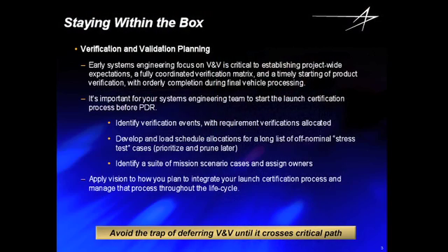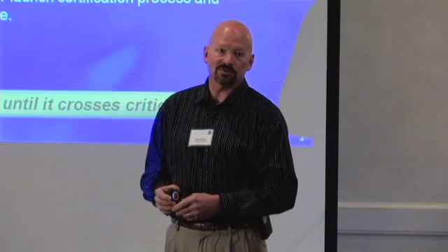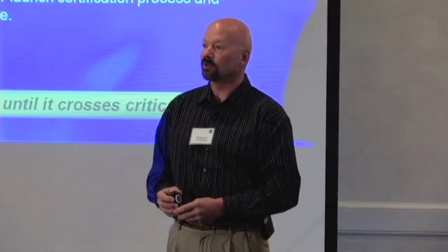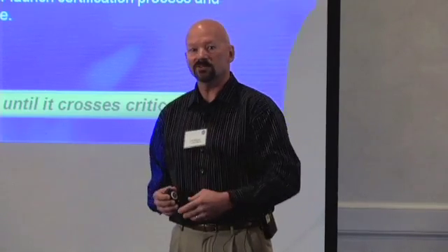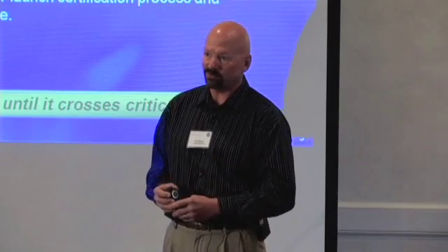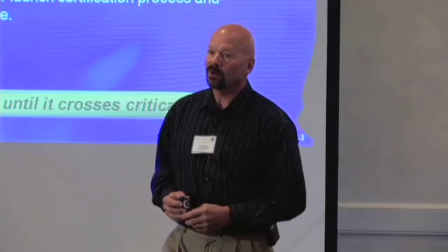All right, verification and validation, another systems engineering theme. V&V is something that the projects tend to consider as being a mid to late life cycle task. You're in phase B, you're working on your PDR, and somebody says, oh, it says here one of the gate criteria is we need a verification plan. Well, if you're only putting your verification plan together because there's a matrix requirement that says you need a verification plan at PDR, you're in big trouble.